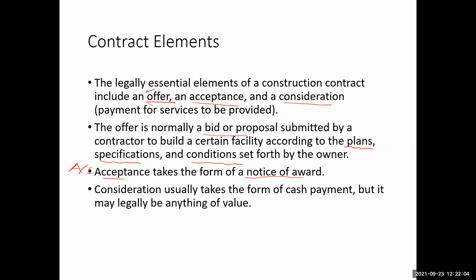And on the other hand, what is consideration? Consideration usually takes the form of cash payment, but it may legally be anything of value. That means when the contractor performs the work, and in return the owner pays the contractor some cash, or the value for the work which has been performed, then that consideration element of the contract takes place.